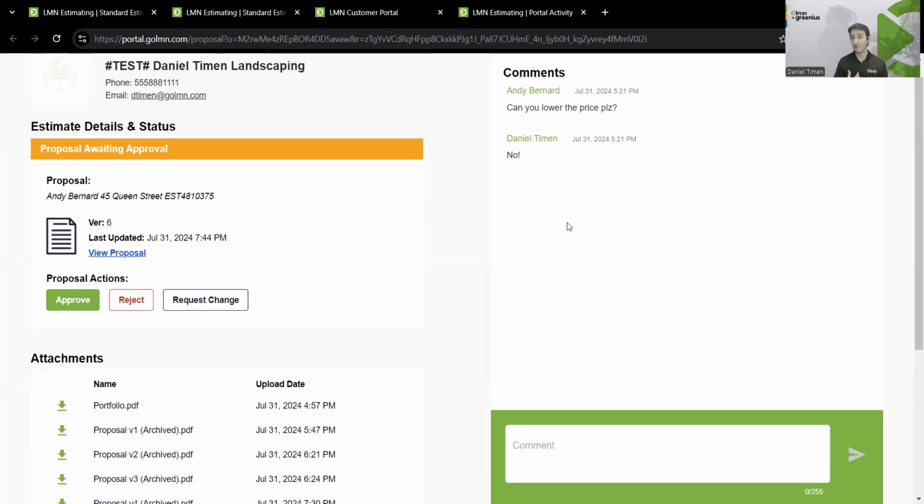If I, as a contractor, am risking starting to build a patio on the wrong bid, and then the customer tells me halfway through, that's material and labor already spent. So to really cover our bases here, you should keep it in the same entry because that way the customer always knows what they're looking at and what they're actually signing. And at least due diligence wise, you've done everything you could on your end to keep things as consistent as you can.